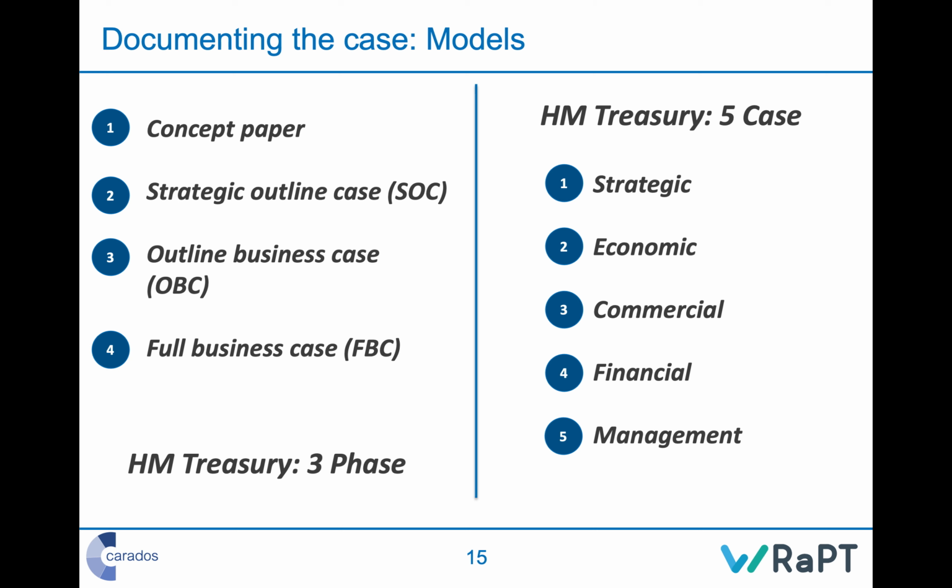What's the strategic fit and the clear case for change? The economic, so financially, what good does it do? Commercial, who's going to deliver this in terms of doing the work if we're going to get third parties to do it, and therefore how are we going to get the best commercial deal from those?